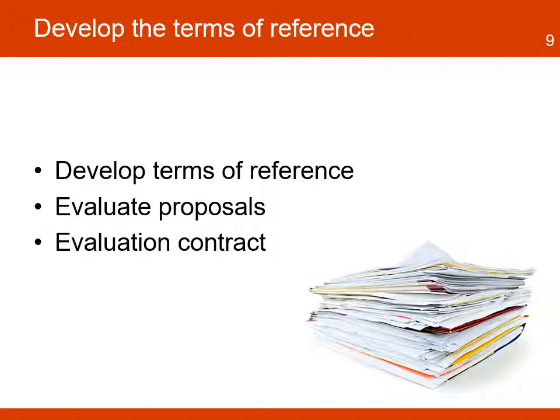The development of the terms of reference is the next step. It defines all aspects of how an evaluation will be conducted and helps in the selection of a consultant if the evaluation is external. The project manager will participate in the evaluation of the proposal and the award of the contract to the consultant selected to conduct the evaluation.